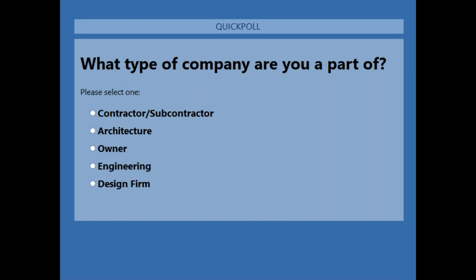So if that specific day you couldn't do your concrete pour because there were flash floods, go and make a note of that on the daily diary. So whenever there's any issues in the project at a later stage, you can go back and see, oh, that's why we were delayed on that specific bit of the project, because we had weather issues. You can also add your labor, companies on site, how many workers, how many hours, add photos and notes.